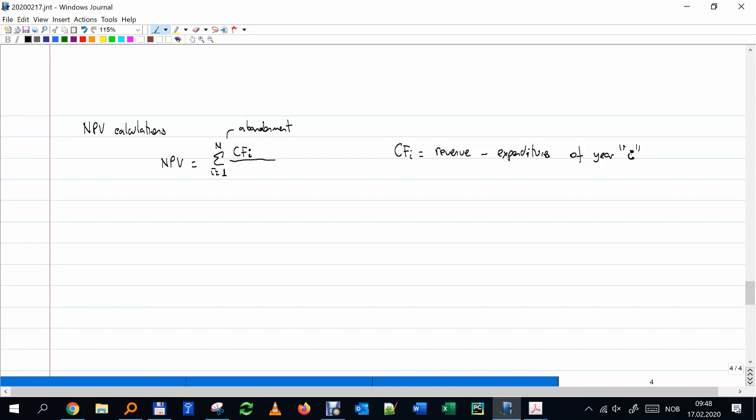Okay, and then to be able to sum all of these dollars between them, I have to discount each one of them, to the power of, let's call not this i, but use another letter. Okay, let's call it maybe d, where this d is the discounting factor, discount factor.